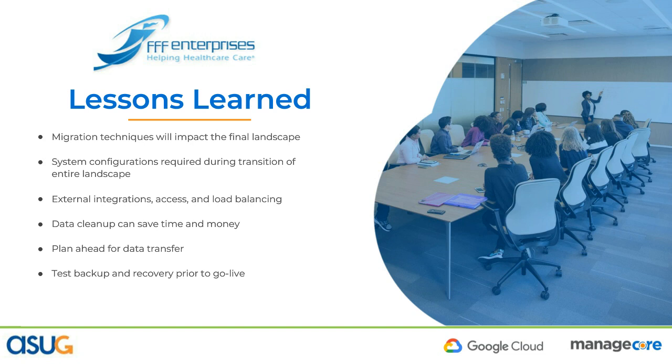Now, often overlooked, if you're thinking of doing your S4 or BW on HANA migration soon, you want to start possibly doing data cleanup because it can save you time and money. Depending on how much data you have, if you have a 10 terabyte database, for example, but you can clean up 4 of those terabytes, that's a significant improvement in cost because you don't have to pay for the larger instance. You don't have to pay for more disk, but you also will get a faster go live should you have to transfer the data maybe via a homogeneous or heterogeneous system migration.